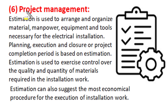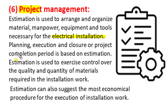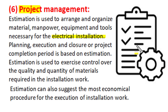One important purpose of estimation is the management of the electrical installation project. Estimation is used to arrange and organize all sorts of material, manpower, equipment, and tools necessary for the smooth execution of electrical installations. All parts of the project — planning, execution, closure, and completion — along with cost, are based on estimation. The information from estimation is also used to exercise monitoring and control over the quality and quantity of material and workmanship required.